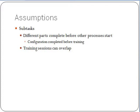In planning a project in this way, many assumptions need to be taken into account. Within sub-tasks, different parts need to be completed before other processes can start. Also, training sessions can overlap.